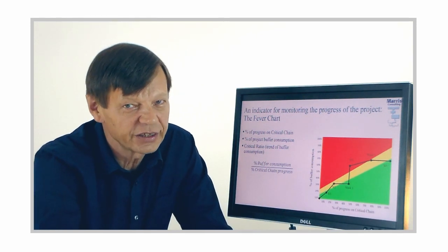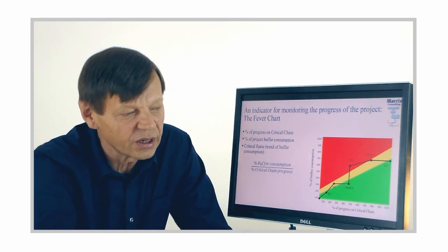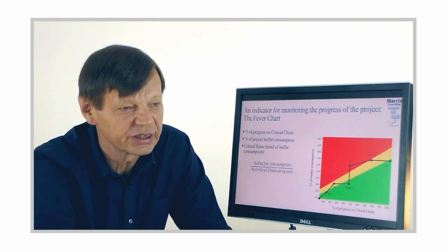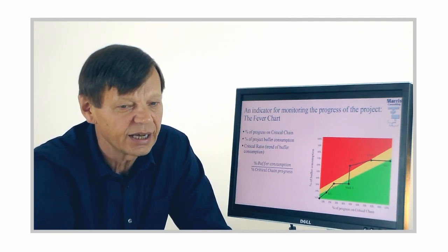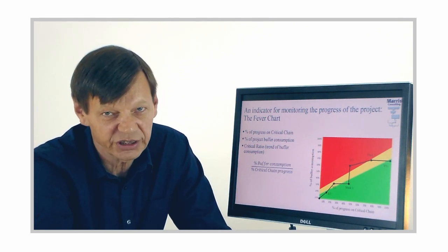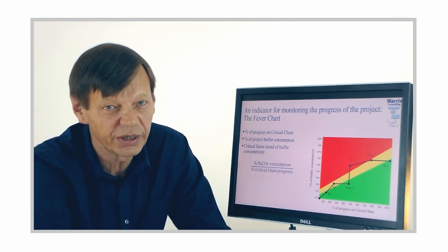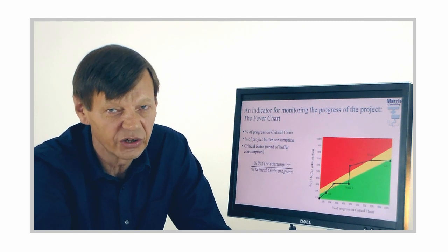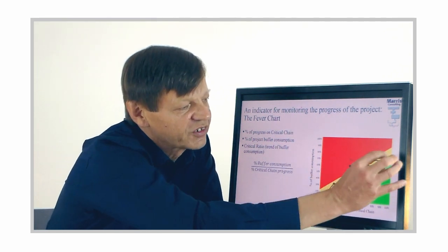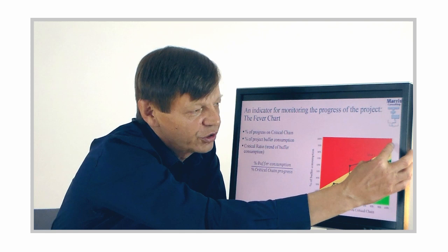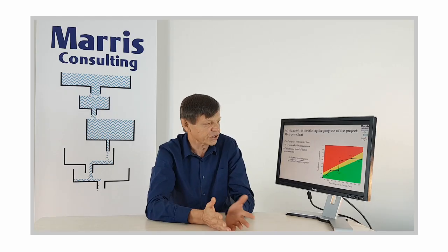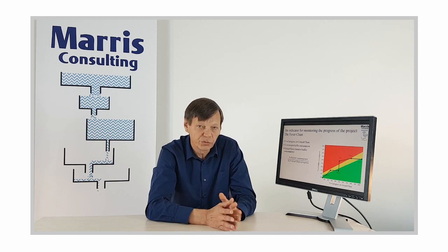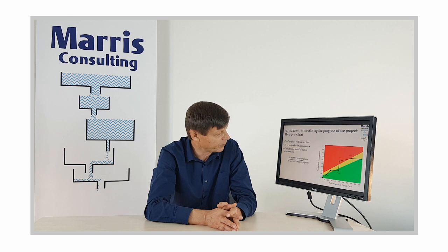It's something that you need to get used to, but in the world of projects where everything is uncertain and there are risks all over the place, until the project is finished, you never know it's really finished, right? And so if you want to finish all your projects on time in an uncertain environment, you better aim to finish all your projects early, okay? And so when systems are properly tuned in critical chain, you should be finishing around here most of the time, right? So that is how you monitor the progress of a single project using critical chain.